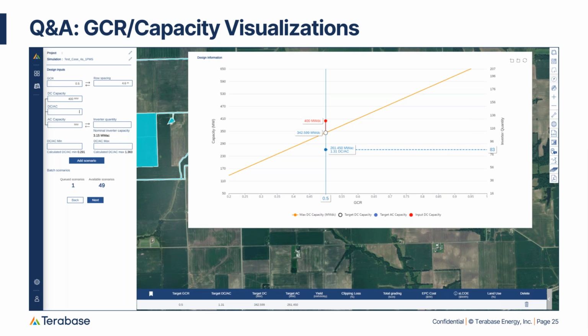Also, a lot of those line items are calculated by using the cost of labor. So for example, I have to install thousands of torque tubes. We know how long it takes to install a torque tube and how many are installed, so you get a total time of torque tubes being installed. And then we assign a labor class to that, so it'd be a general labor installing the torque tubes. And we have a cost for that labor that does come from RS Means as well.